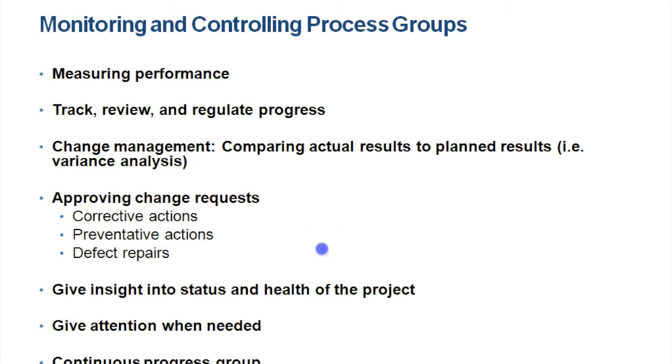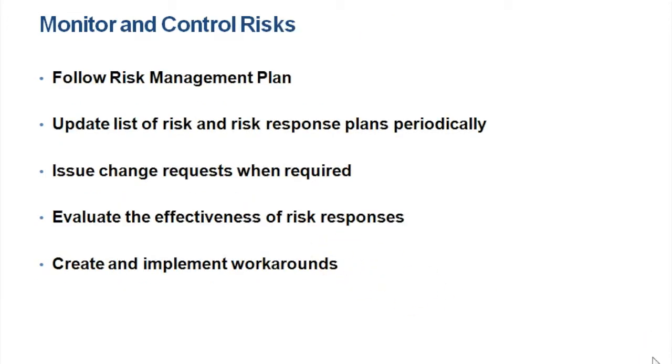So, all right, monitor and control risk. Okay. So you're going to follow the risk management plan. A big part of the monitoring and controlling process is risk, right? So your job is to constantly regulate the risk, updating the risk management plan. On past projects I've worked on, we submit a risk plan weekly up to higher management with details of what we think the risk of the future would be, any resolved risk from previous weeks, and any that might come up, and what the response plan would be to those.